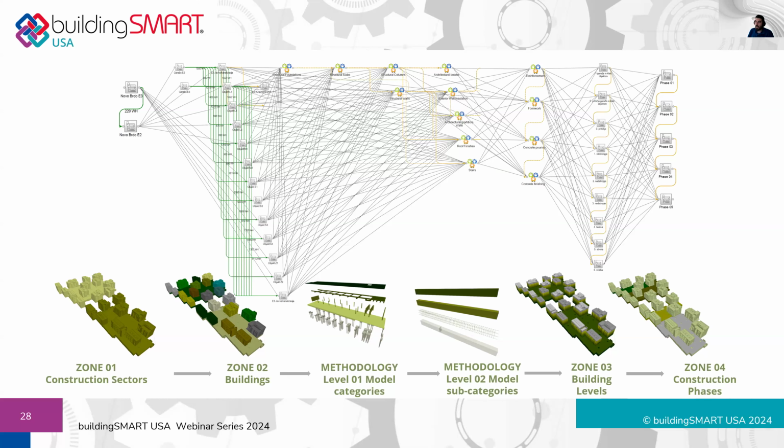and probably in every future project of the same typology. So instead of every time going and creating a schedule from scratch, we're going to define this methodology, this logic of project execution that is relying upon estimation, that is already organized into a classification system, that is the common language that we could all understand. And in every future project, I could simply reuse it, and I can get the schedule with a few clicks, basically using this system. And it's pretty versatile.